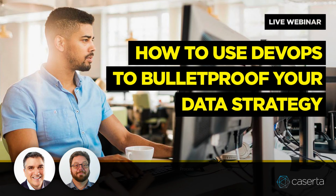So if you are considering converting into a DevOps environment, the tech is the easy part. The real challenge is the people around the tech, and really having a very intentional method of getting those people to come along for the ride and train them, reskill them, or potentially have to replace them, right? But something needs to be done. If we just build a new technology platform and initiate a new way of doing things without having a specific program, a separate swim lane that goes right alongside your project management of the technology implementation, you need to have a people adoption and training implementation as well. Very important.